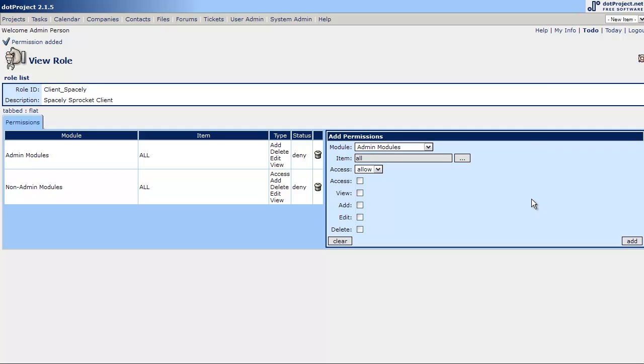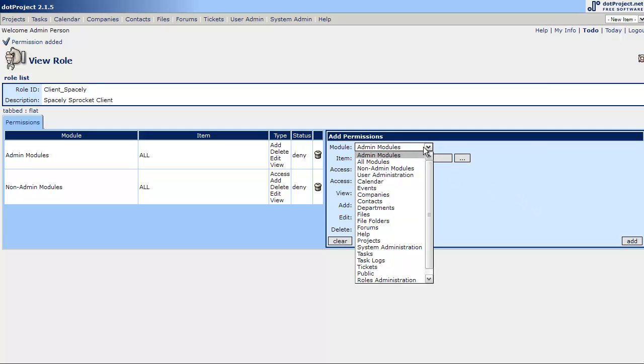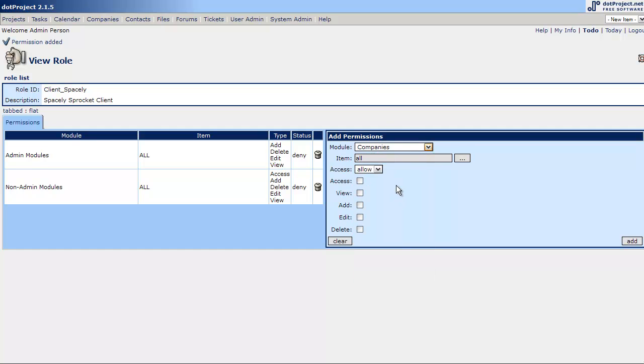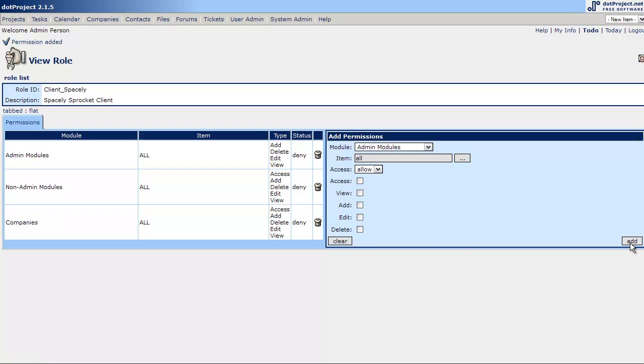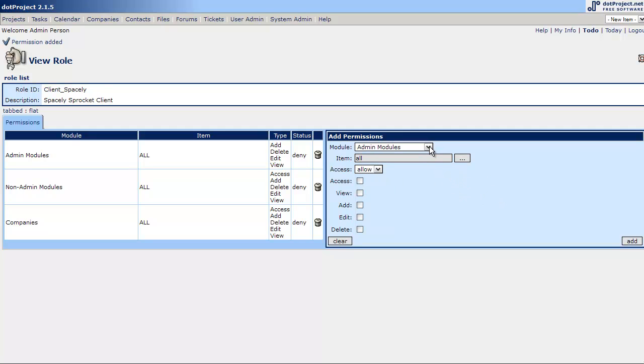So, at this point, the client has no rights. So, now we're going to add company. We're going to leave it as all. And we're going to deny access to all. Access, view, add, edit, delete. So, you may be asking me now, why am I doing all this denying? Well, the whole idea is to kind of wipe the slate clean because if you don't, there's little odds and ends that pop up where a client can see other information that should not be privy to them. So, what I first like to do as a practice is deny access to everything and then build back what I want them to be able to see. So, maybe a little far-fetched, but to me it's worth the time.